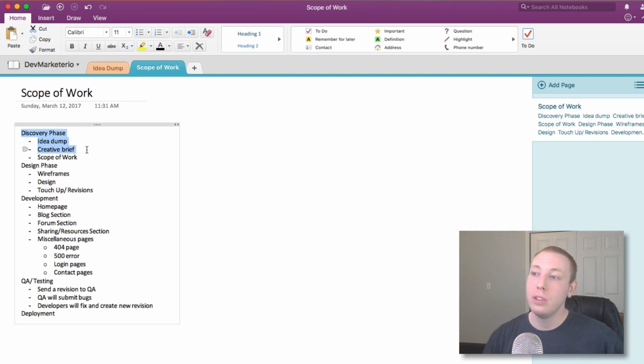It also allows you, when your client inevitably complains about the time frame that everything is taking, even though they previously agreed to it, to point them back to it and say, hey, the scope of work said we're not starting this phase that you're complaining about until April 1st. It's only March 20th. We're on schedule. And it allows those conversations to be pretty easy without there being any resentment on either side. So this is so important. I can't reiterate enough how this will solve all of your problems as a web developer, a web designer, anything like that.